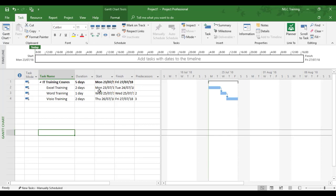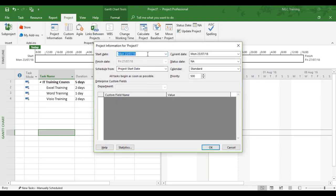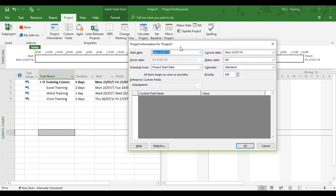All these dates at present are starting on a start date of the 23rd. This is coming from the project information on the project tab, so that's where the start is coming from.